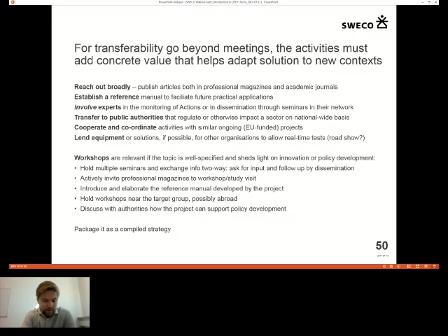There is nothing wrong with workshops, for example. I mean, this is also kind of a meeting, as long as every workshop has a clear objective, or you have to clarify this very clearly in your activity description. The why is very important for every workshop. And also you need to motivate somehow the number of workshops. You cannot arrange 20 workshops for no reason. I've tried to include that in the past to get a higher performance indicator. That doesn't work. It's a really bad idea.